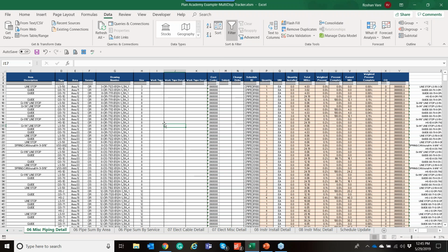And one single planner on these multi-million-dollar jobs, even billion-dollar jobs, is impossible. You're just going to choke your planning team, and you're going to go 6-8x on your number of planners required on the job. And no offense to the folks on the call, but planners aren't cheap. And so when you're looking at trying to run a project and a project controls team and then managing your sales with it, it just gets very difficult to justify a team that big.